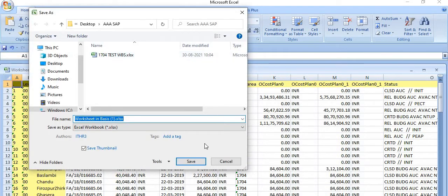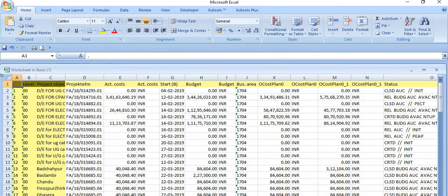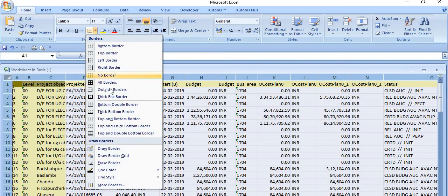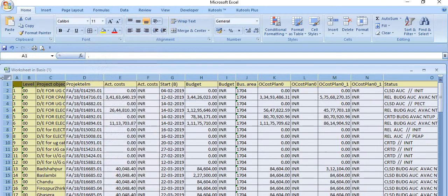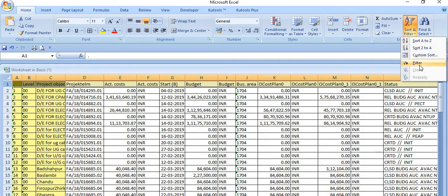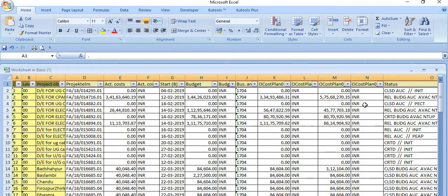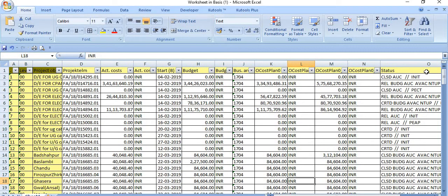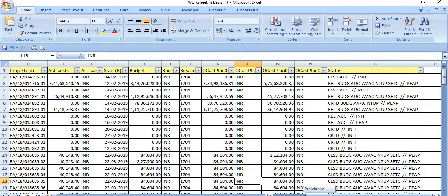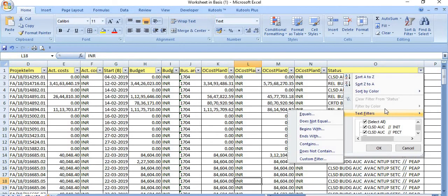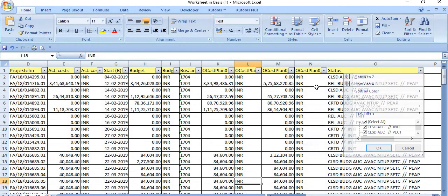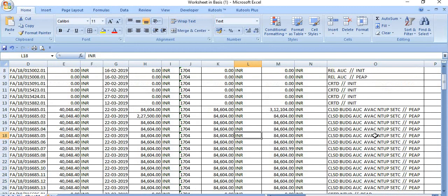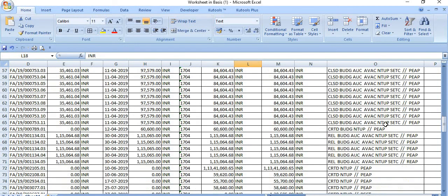This data is saved. We can apply the filter. Select this line and apply the filter on the status tab. There are various statuses: CLSD means closed, release means in the release state, CRTD means in the created state.